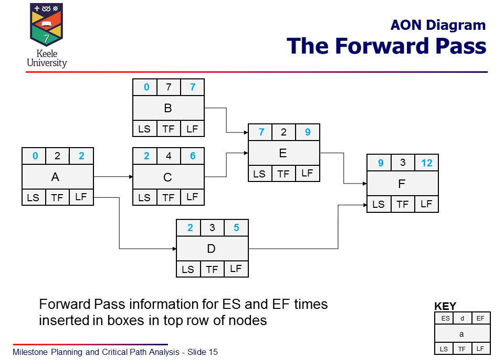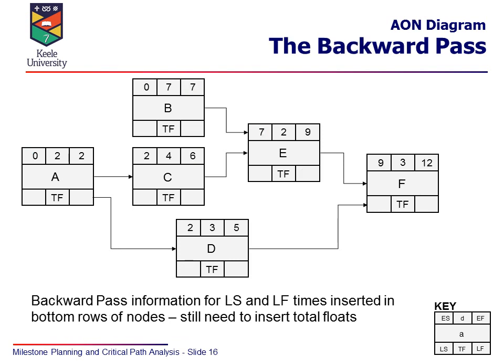Now let's say we want the project to actually finish on day 12, and so what we're now going to do is do the backward pass, but we're going to put day 12 in as the latest finish for the last activity. And that's what you do in the critical path method. You take that time and then you work it backwards using the earliest finish time as the latest finish time. So moving on to the next, that's the information we have in already, but what we're going to do is put 12 in as the latest finish time.